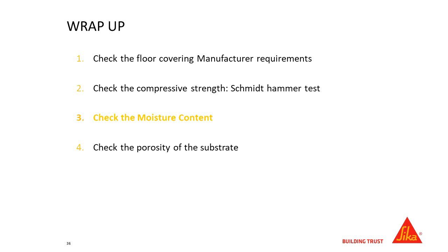And one of the nice things with the SIKA MB is you do not always have to bead blast. The only thing we ask you to do, if you have old adhesive, is take up 50% of it. A lot of times that can be done by scraping or scarifying. Much easier and less expensive than bead blasting. The other thing we tell you to do is just make sure the slab is porous.